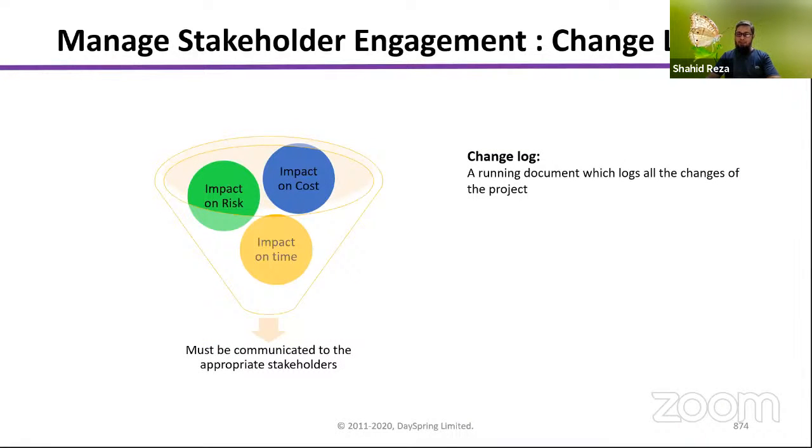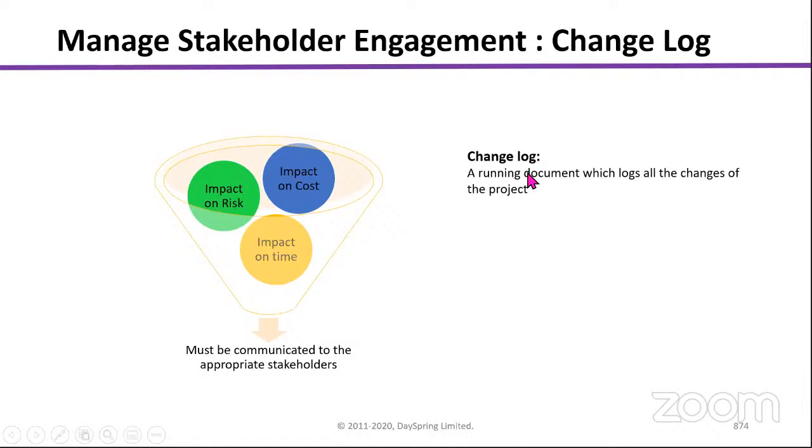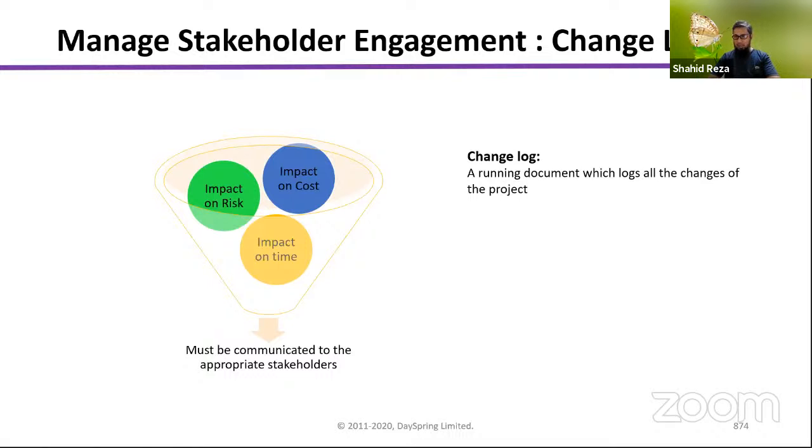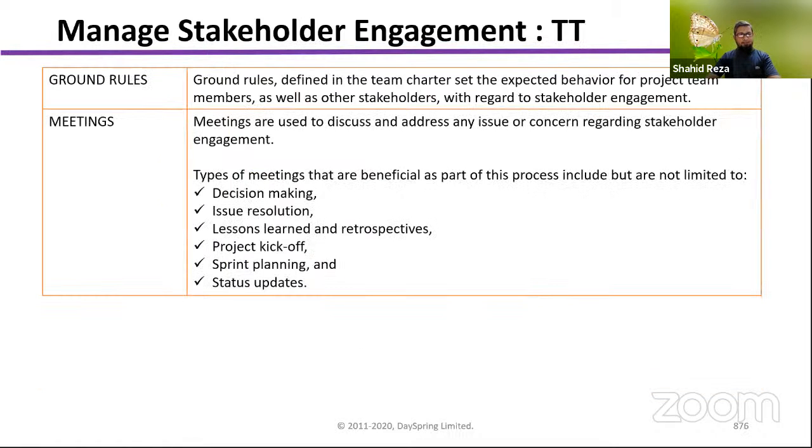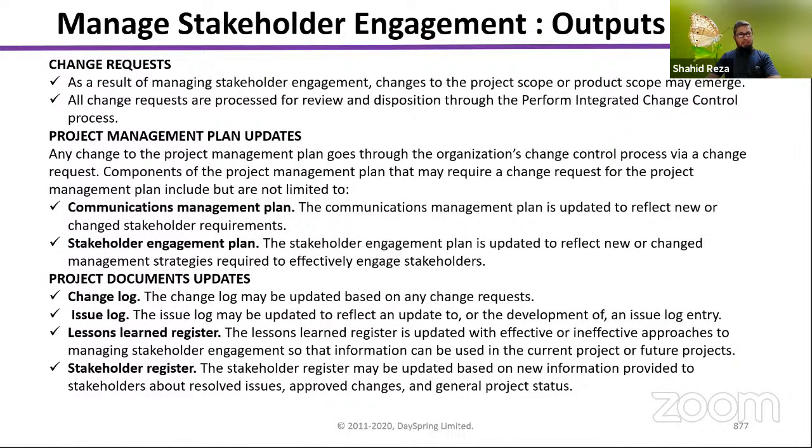So the change log, every change you have to capture here. And when you are logging a change, we will talk a lot about change. When there is any change arising in your project, you have to analyze what the impact of this change is in respect of cost, in respect of time, and also on risk and resources. Those are the things we have to analyze before doing the change. All right, so I think this process is done.